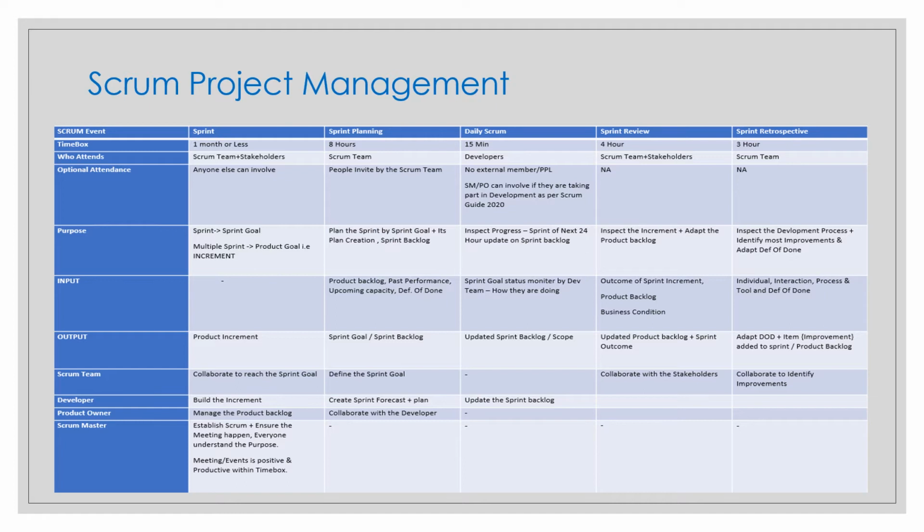Okay, so Scrum mandates that each product backlog item has its value. The simplest way to have a value is to create a simple value scale, and on a scale you can set values starting from say 100 to 1000. So my value is 100, my value is 200, 300, 500. Based on that value you need to target, right? So each PBI in your product backlog has its value.